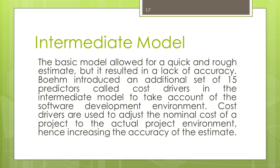The basic COCOMO model assumes that effort and development time are functions of the product size alone. However, many other project parameters besides product size affect the effort and development time. To obtain an accurate estimation, the effects of all relevant parameters must be taken into account. The intermediate COCOMO model addresses this by refining the initial estimate obtained using the basic COCOMO expression with a set of 15 cost drivers based on various attributes of the software development.